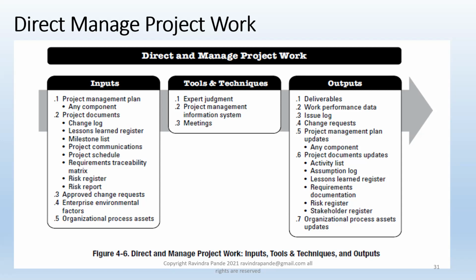So normally whenever a resource leaves a project team, there's a learning curve involved for the new team member. And for such a scenario, what we normally do is align some bench resources to work with your project team. And these are again a kind of adopted best practice by a good number of companies. But again, depending upon the companies you work with, the bench resources might or might not be available for your domain, for your nature of work. So again, it depends on availability. It depends on the market demand and supply scenario also. So that's how we normally review risk on almost a weekly basis.